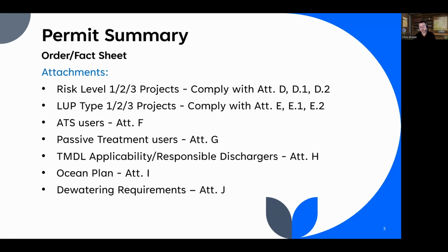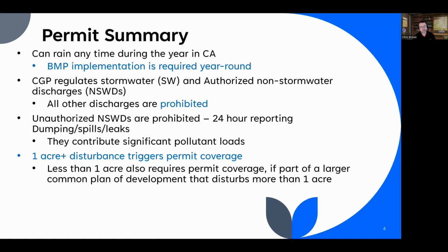And we're talking about pre-notification to the Regional Water Quality Control Board. These discharges are subject to the NALs for pH and turbidity. That's just to name a few. There's a whole list of requirements that would go along with utilizing this permit for any sort of dewatering operation. So just be very careful. Dewatering is absolutely not allowed unless it is a permitted activity, either under that pre-existing regional dewatering permit or a permitted activity under this permit, and we would have to comply with this. I know that was a lot, but it's an important thing. It doesn't get talked about very much.